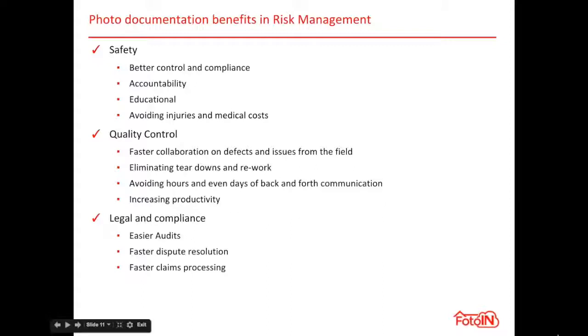kind of another anecdotally, I know probably one of the places we see the most money lost is when we get to the punch out phase, or we start putting in finishes, and all of a sudden it seems like wall damage. It's like you've got gremlins running through your job site at night with hammers putting holes in walls, and yet nobody ever takes the responsibility for it. So I've got a few trade contractors I've noticed, when they finish a room, they'll take photos of all the walls in that room to show that, hey, when we walked out, our stuff was good. Now somebody else is going to have to help us pay to fix these problems.